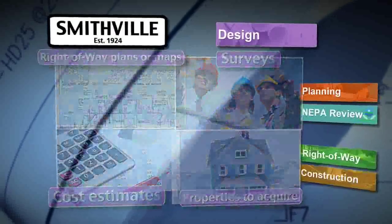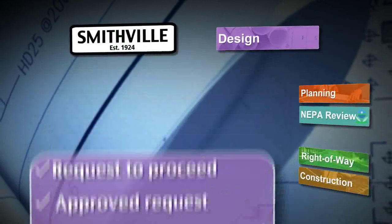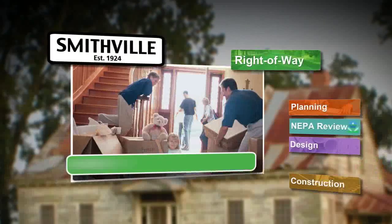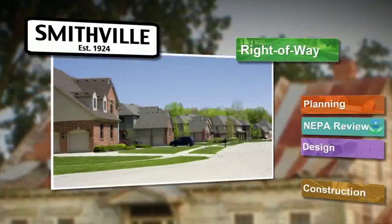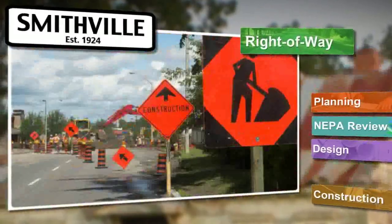The city then sent a request to the state DOT to proceed. After obtaining the authorization to proceed, Smithville began acquiring the right-of-way properties and relocated landowners and tenants according to federal and state laws and regulations. The city managed all the acquired properties to ensure they were safe and secure. Before construction began,